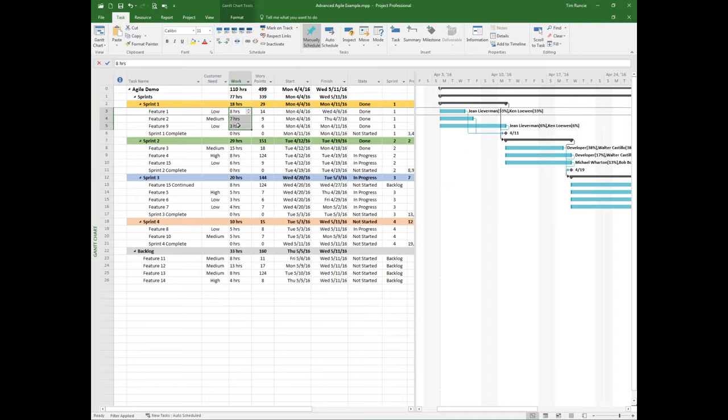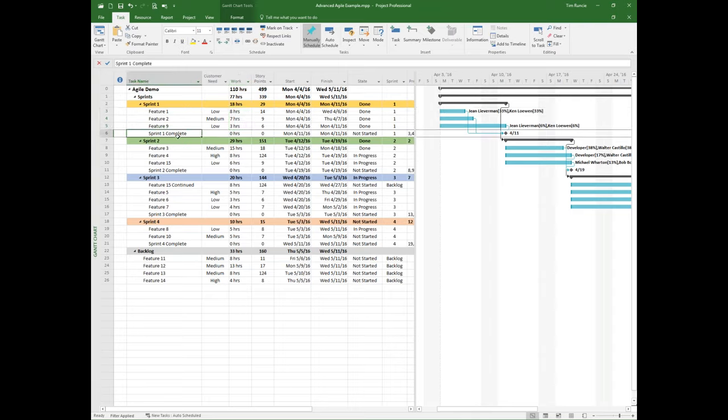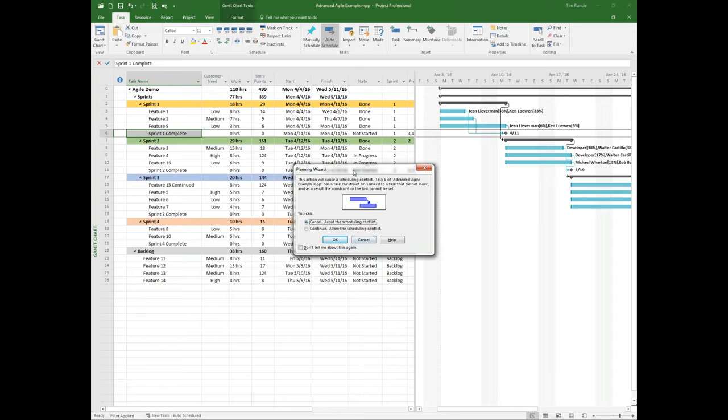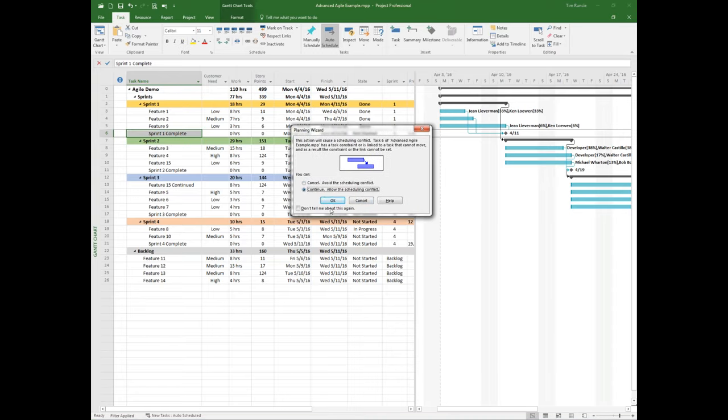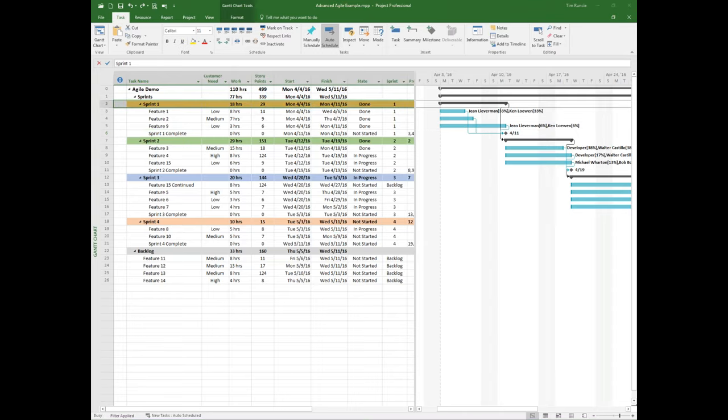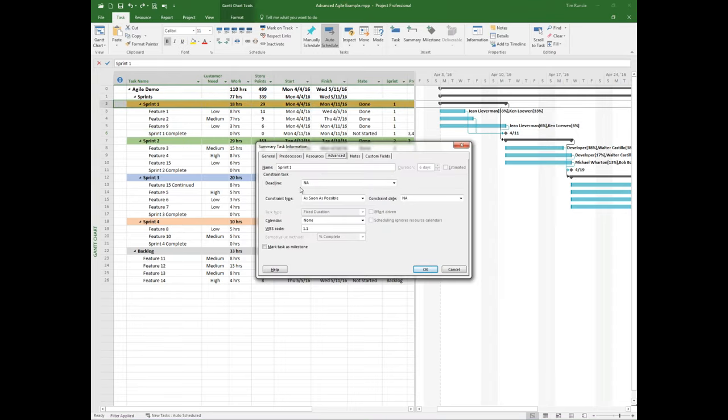And so you might be trying to weigh or balance when things will get done based upon their complexity factor. From a good scheduling perspective, I try not to disconnect some level of effort around how many hours that might be or the time period. But remember, a sprint is a time boxed period. And this is really important because a best practice will say, what you want to do is lock down information around an activity. In fact, one of the things that comes up is I'll have people building these sprints, and they'll say, if I'm managing this, and I actually come out here and I just change the duration, it's possible for me to increase the overall amount of time of a task or an activity beyond the amount of time that that sprint will be. In fact, you notice here that I'm getting a note that says you're going to create a scheduling conflict.